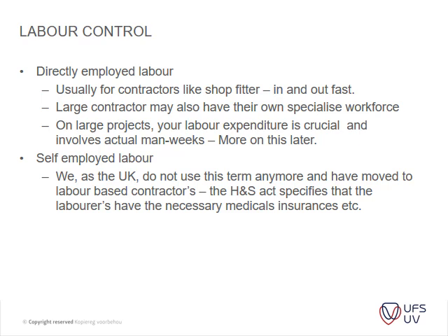And then it depends on the size of the contractor as well, and the location. For instance, if you're a contractor in Joburg and you get appointed here in Bloemfontein, you might appoint a bricklayer from Bloemfontein here just for the project, or a labor-only contract for that. Or the other option is to bring that person from there, but then you need to organize lodging and so forth. Whereas if you appoint someone here, he already lives in the vicinity. So that's the type of considerations that you need to think of.